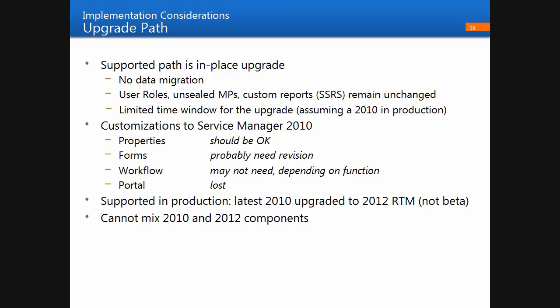Now for implementation considerations. The supported upgrade path is an in-place upgrade. Because it's in-place, you won't need to migrate data, and your user roles, unsealed management packs, and custom reports published to SSRS will remain unchanged. The challenge with an in-place upgrade for a production system is that you'll have a limited time window, so there are considerations around planning, risk, and the upgrade approach. Customizations depend on the type: schema extensions — adding properties to existing classes or creating new classes — should survive the upgrade, with some potential exceptions for naming conflicts.